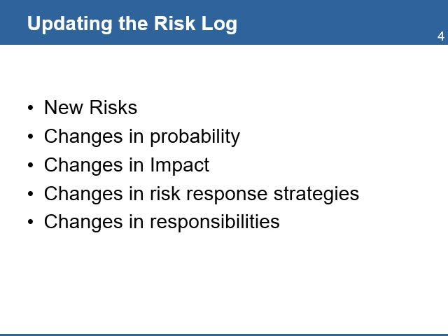the original risk log. This will also result in changes to the risk factors and the priorities you need to focus on. The updated log will have changes in the strategies to respond to the risks, and you will need to review and make changes to the original responsibilities assigned to manage the implementation of preventive actions.